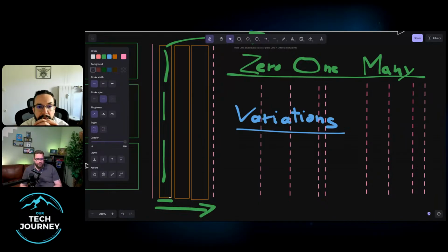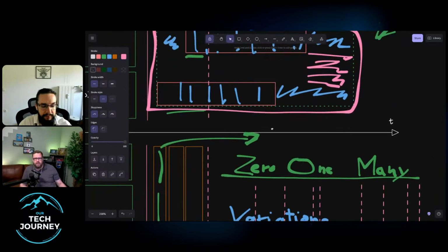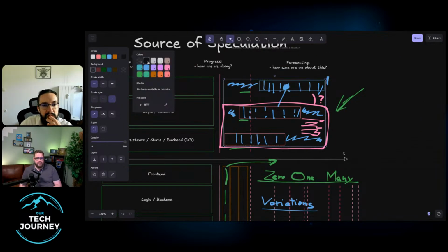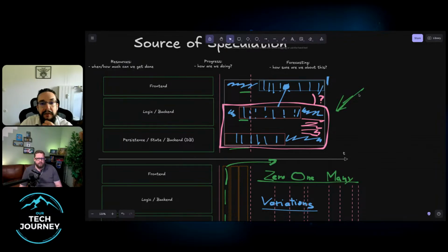And the bad thing with the upper approach, where we have this black box timeline, three weeks, something like that for a feature, is that the more you get to the end, the less likely it is that people really want to implement changes because of sunken cost fallacy. We've gone all the way already.